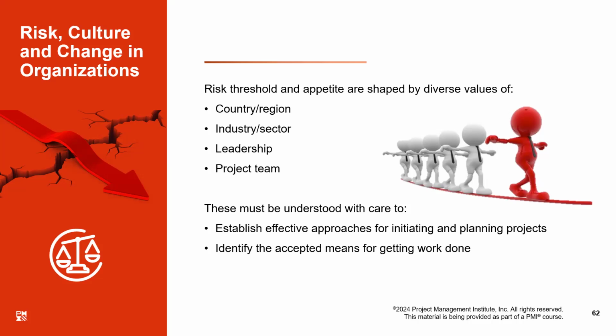These must be understood with care to establish effective approaches for initiating and planning projects. Well, risk threshold is the first thing you should understand. Because if you don't know what is acceptable to the organization, then you may be planning something which is beyond the acceptance level of your boss or your organization.